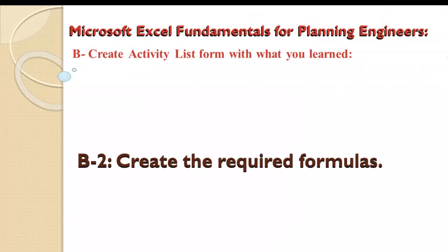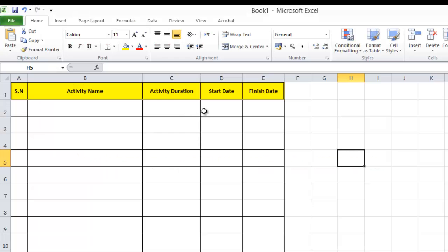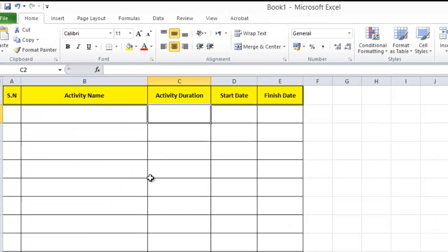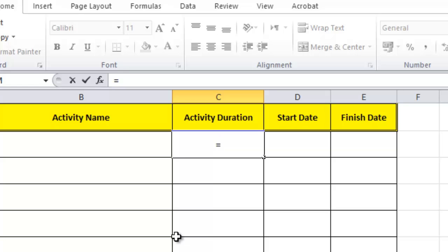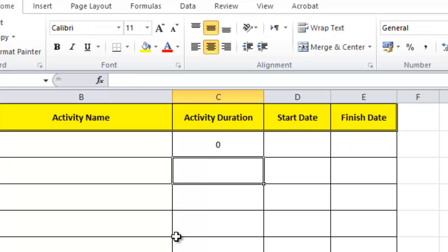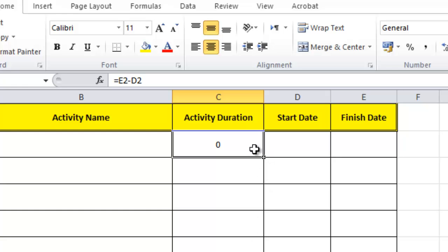The second thing we'll do is create the required formulas. The only formula I need here is to calculate the activity duration, which equals the finish date minus the start date. To apply the formula to all rows, I'll drag from the right corner or double-click.